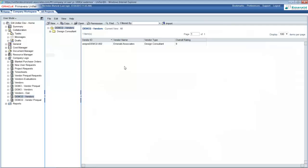When the vendor prequalification has been approved, a new entry in the vendor master list will be created. The vendor information will be auto-populated from that vendor prequalification request. Here we see the vendor name, type, ID, and overall rating have been auto-populated.